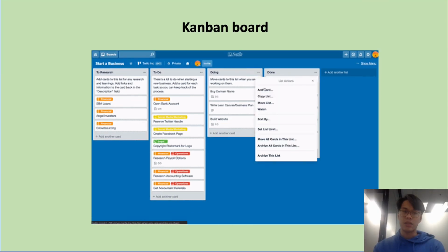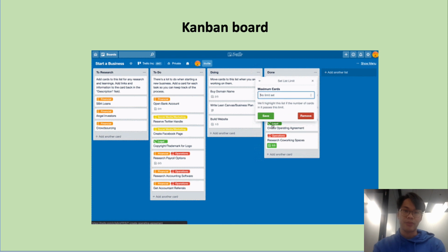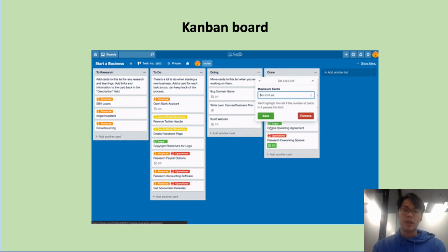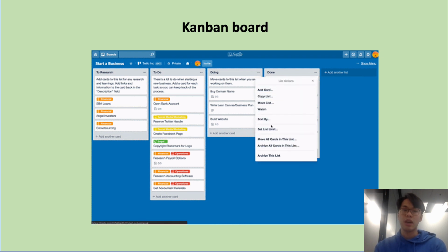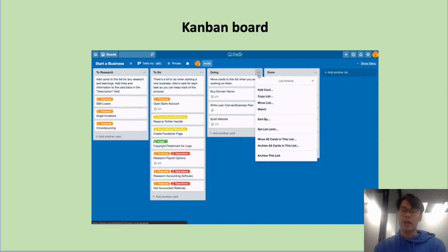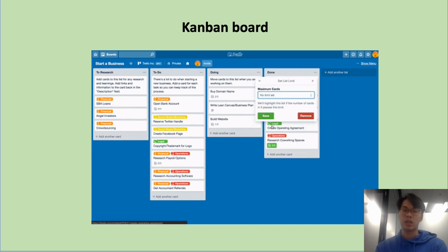As you can see, the Kanban board is composed of To Do, Doing, and Done columns, which are the main three columns. Any problems raised by other departments would be put into the To Do column, and when the IT people are ready or have some time to do it, they'll put it into the Doing column, and when it's done, it will be put into the Done column.